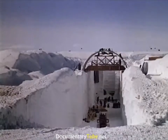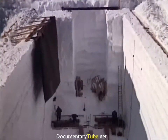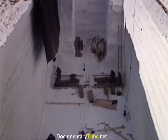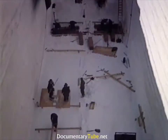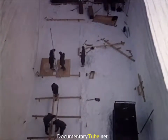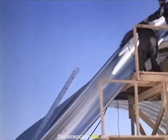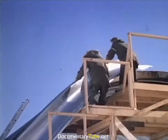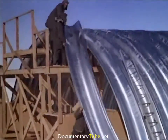The continuous sunlight caused us plenty of headaches. A black tarpaulin was used to protect the section of this 40-foot cut most vulnerable to the sun's rays. Below, foundations and structure for the reactor building were put in place. Until the trench was covered, there was always a threat that the 40-foot arches would collapse a shoulder already weakened by the 24-hour-a-day Arctic sunlight.